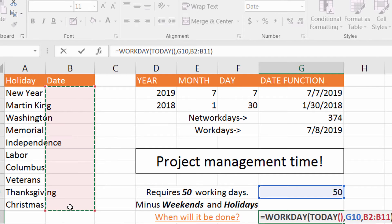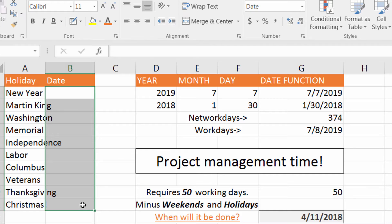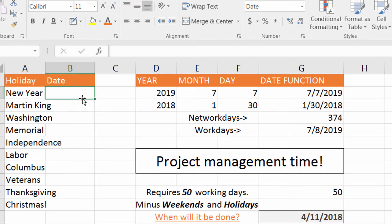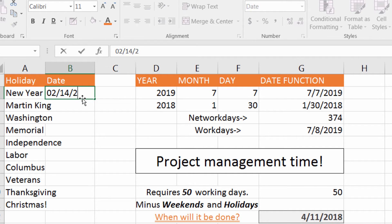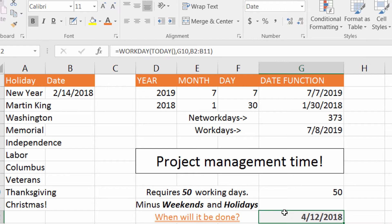So I add a comma, then a date reference, and we can see that it acknowledges all of that even though it's blank. So maybe I want to put in Valentine's Day — 02-14-2018 — and we can see how the end date changes over there.